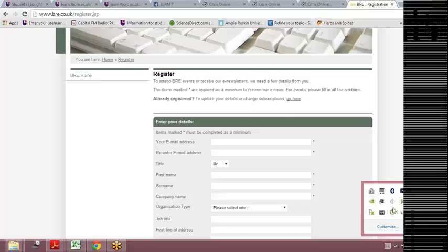The first part is the confirmation, basically the preparation before doing any demolition. After that is the fencing and construction of the foundations. Four is the structural part, the metal erection of these buildings. The fifth is the servicing of the interior spaces. The sixth is more of the CDM and the health and safety part, which is for Part A. We included it just as a reference.